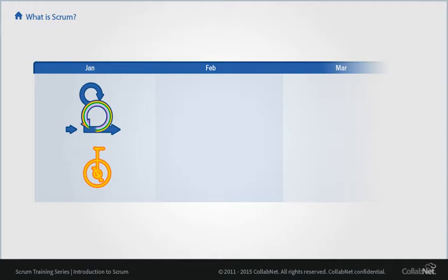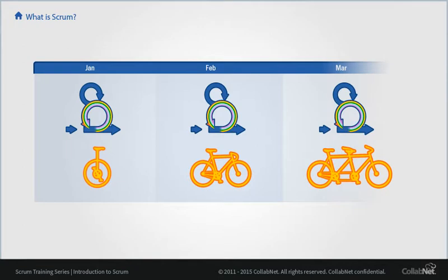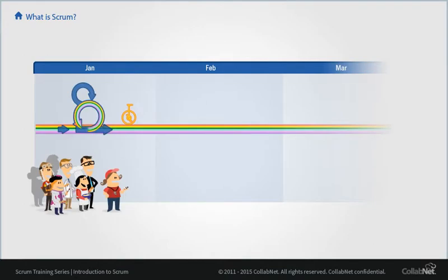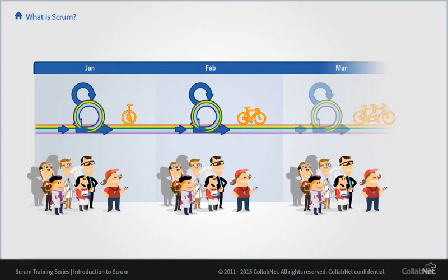Customers often need to see the wrong product before they can specify what they really need. With short iterations and more feedback, we have a better chance of discovering the right product. While the product owner doesn't actually have to ship every sprint, it's the team's job to make it possible. Sprints are officially 30 days long, and most Scrum teams are doing them in less, such as 2 weeks. To make a shippable product every 2 weeks, we're going to want people with skills in testing, in design, in business requirements, in coding, all on one cross-functional, self-organizing team.